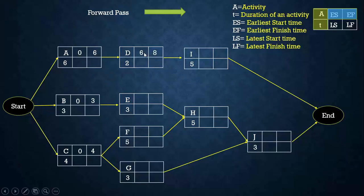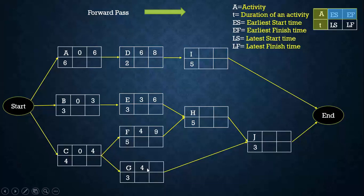The earliest finish time of D is 6 plus the duration of activity D, which is 2, giving 8. For activity E, it needs B to complete, so the earliest start time is 3, and the earliest finish time is 3 plus 3, which is 6. For activity F, the earliest start time is 4 because it needs input from C and must wait until C is complete. The earliest finish time of F is 4 plus 5, which is 9. For activity G, it also needs input from C, so its earliest start time is 4, and earliest finish time is 4 plus 3, which is 7.